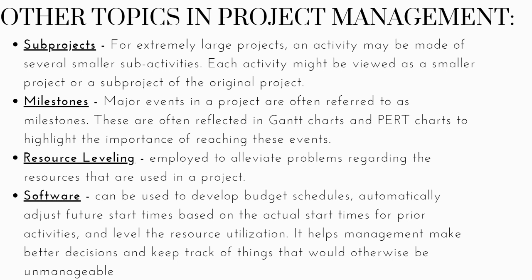In planning a project, and often as part of the work breakdown structure, a manager must identify which resources are needed with each activity. For example, in a construction project, there may be several activities requiring the use of heavy equipment such as a crane. If the construction company has only one such crane, then conflicts will occur if two activities requiring the use of this crane are scheduled for the same day.